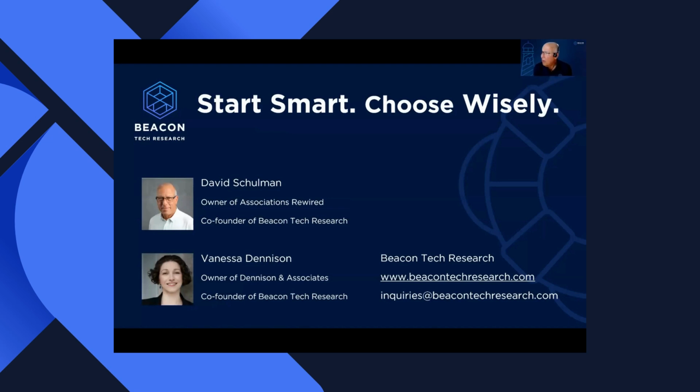Oh, one other tip I'll throw out there when it comes to user acceptance testing. All the vendors, even the lower end ones, are going to do some configuration and customization to meet your specific join process or renew what have you. And you're going to have your people test it. Don't have one person test everything and then give it out to everybody. Have the frontline people in each function test it, because it's not only how they test it and ensure that it meets their needs, but it's also how they learn how to use the software. So this should be an all hands on process. And I'll end with that.